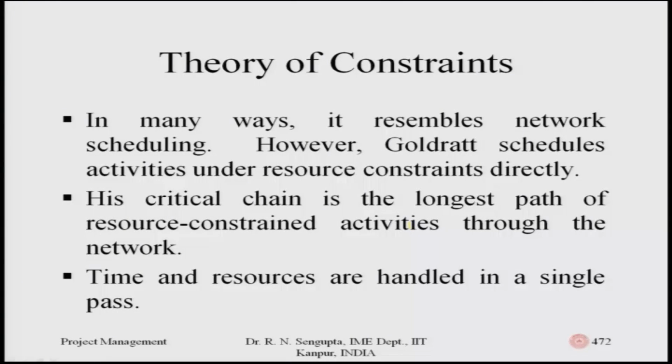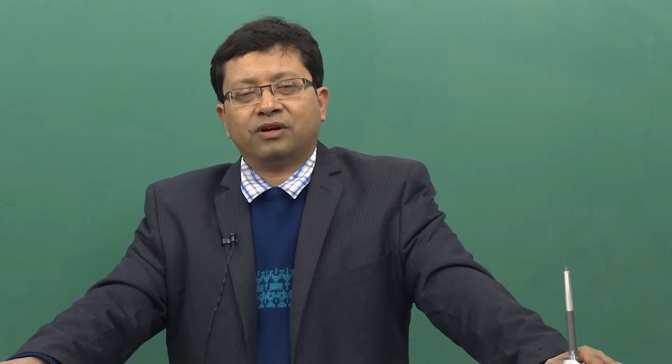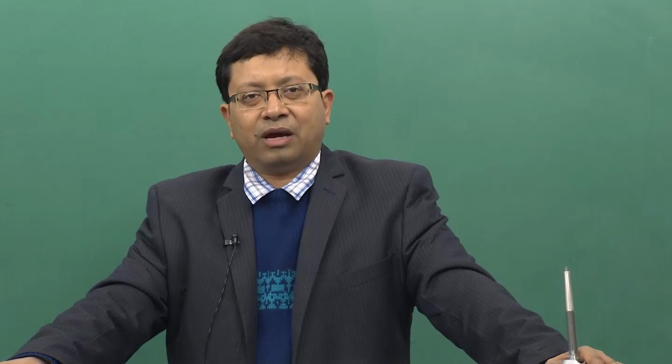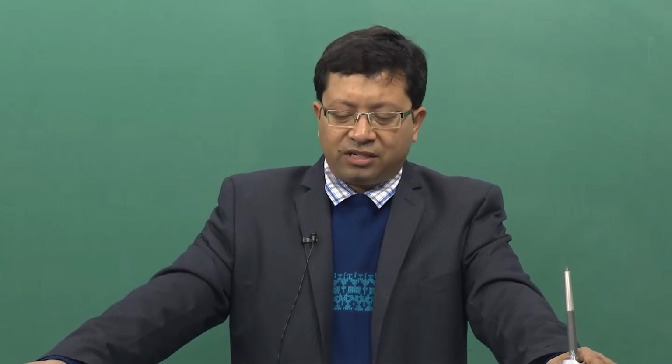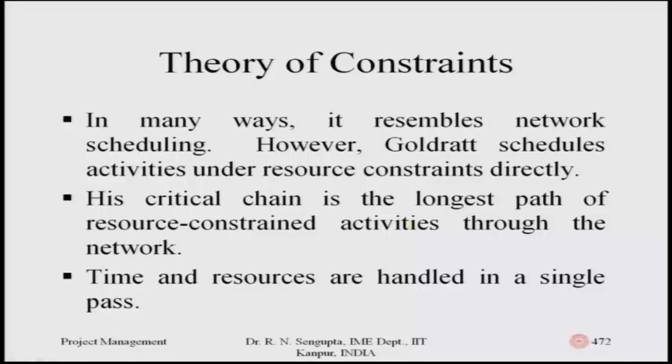So, in many ways I am going a little bit fast in order to inculcate interest in what the theory of constraints is, and then wrap up this course. In many ways it resembles network scheduling. His critical chain is the longest chain of resource-constrained activities throughout the network, which is very widely utilized. Time and resources are handled in a single pass in this concept.